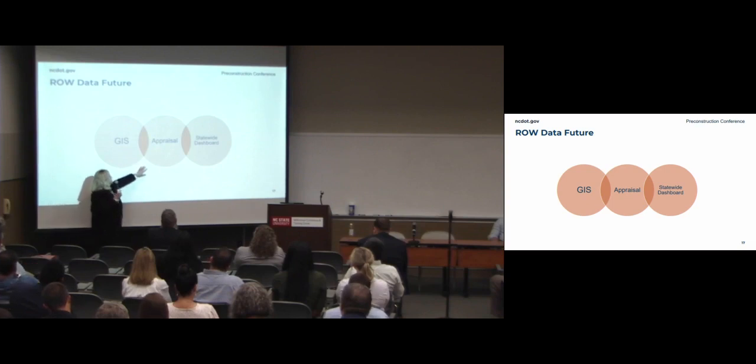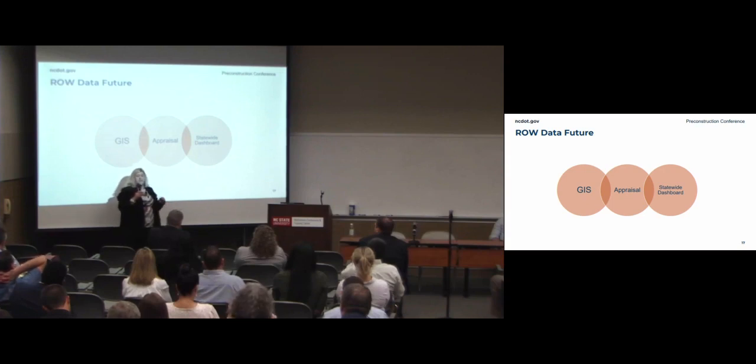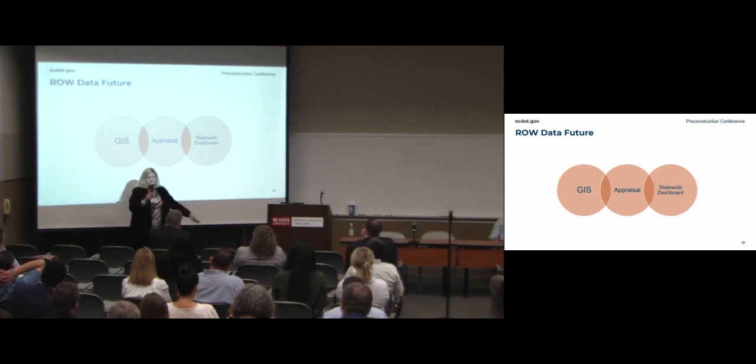We are also going to take all of our appraisal work and put it in a Smartsheet for better reporting, so that there will also be people who will be able to see the status of an appraisal project. This will make for better metrics. We'll be able to break it down not only by the statewide appraisal function, we can break it down by appraiser, by office, and by project. So we can actually see if there's a project lagging, we might need to add more appraisers to it. We can address that quicker and better than just somebody having a feeling that we're not doing right.